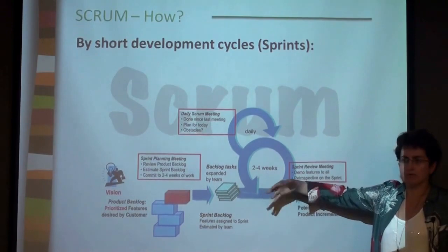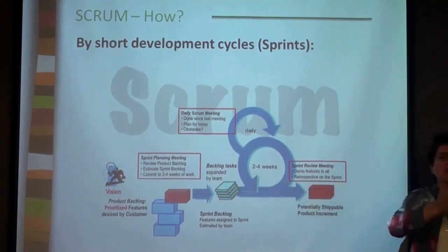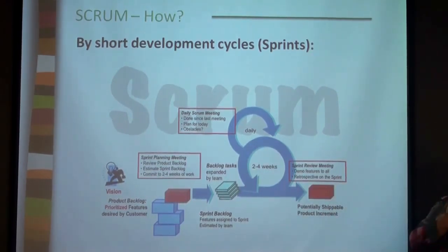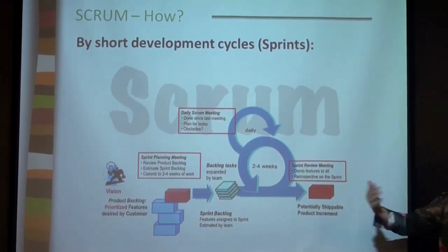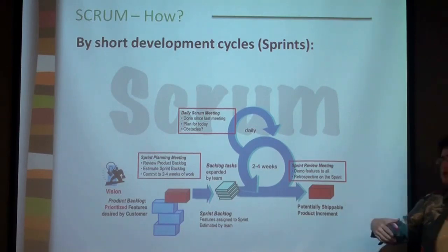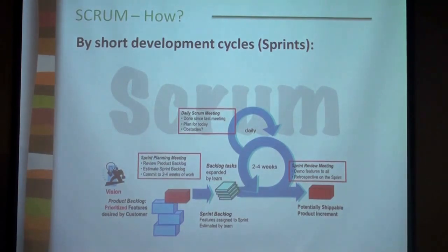If 6 weeks doesn't work for your project, you can choose 8 weeks, that's fine. But the longer the duration you have, the more challenges you have, right? Because the number of code lines developed during 8 weeks will make your product more complex. So the chances of you reaching a reasonable quality level at the end of your increment get lower.